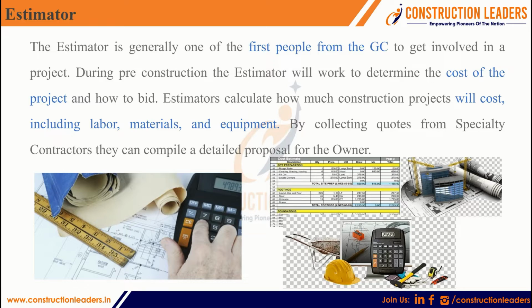These people estimate and calculate how much a construction project will cost, including labor, materials, and equipment. By collecting quotes from specialty contractors, they can compile a detailed proposal for the owner.